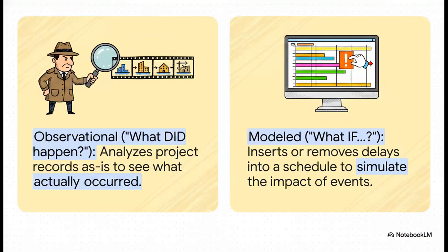This lays it out perfectly. The observational approach is like reviewing the security footage. You're looking at the hard facts, the record of what really happened. The modeled approach, though, is more like creating a computer simulation. You're asking what if. You actually plug a delay event into the schedule or pull one out to prove its exact impact. Both are totally valid, but they answer very different questions.